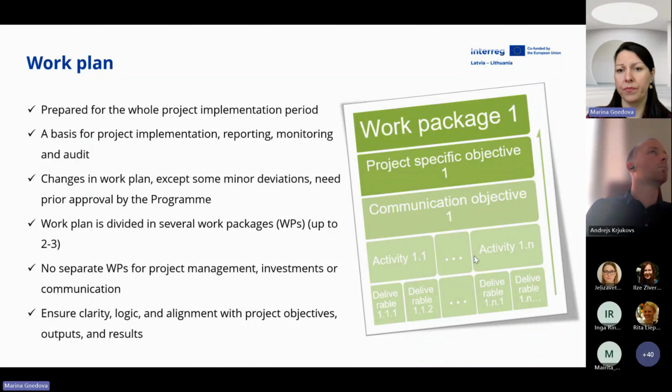On the green picture, you see the structure of a work package, and the work plan might consist of several work packages, as I mentioned already. But please don't create more than 2 or 3 work packages, because then the project structure is very heavy, heavy for you for implementation, heavy for us for assessment.